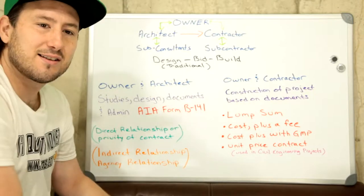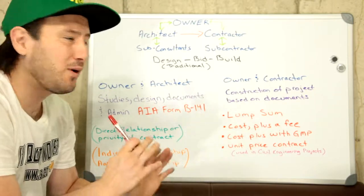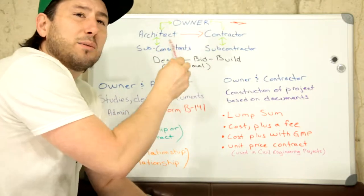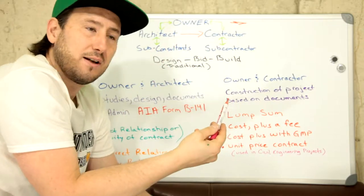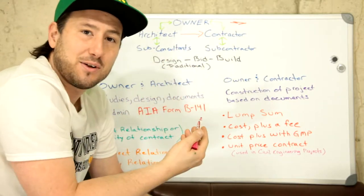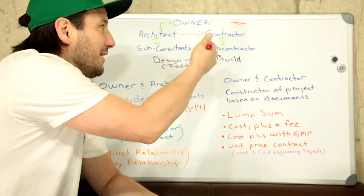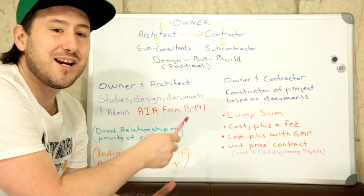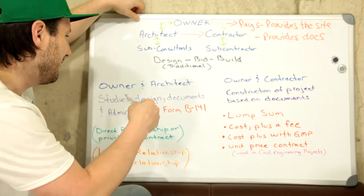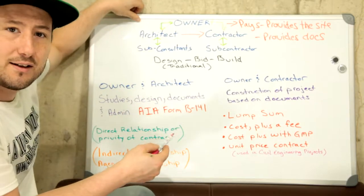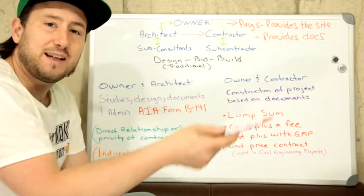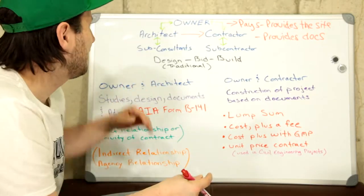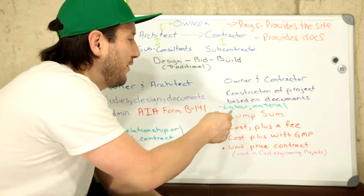It's been around since the late 1800s and is the most popular, widely used contract still even today. The owner will supply the site for construction and will also provide the contractor with the documents, which outline the entire project. The architect administrates the contract as an agent for the owner, providing the design and the construction documents, administrating the construction process, and also providing clarifications to the contractor on those documents.